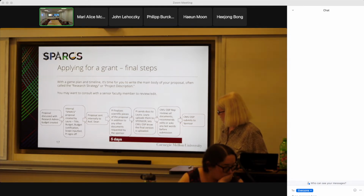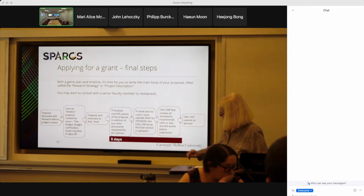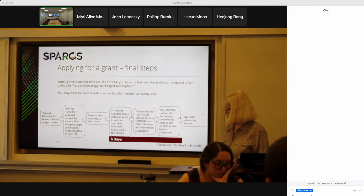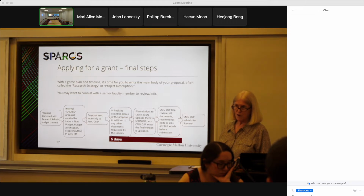So, in here, just a quick review of where we are. We'll talk about the grant in the beginning. I'll create a budget with you here. I'll then enter it into the Spark system simultaneously. At that point, I need the budget justification and your scope of work. Once I get it in there, it'll spill out a document that you have to sign, saying that you're going to follow all of the compliance requirements, not only of the granting agency, but also here at CMU.